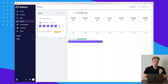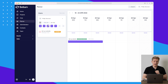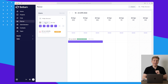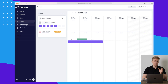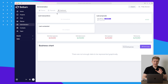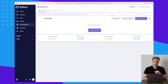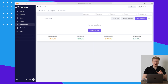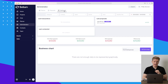I'd like to be able to scroll horizontally instead of clicking the button every time. Over here we can also specify that we don't work Saturday and Sunday and that our hours are approximately eight hours a day.